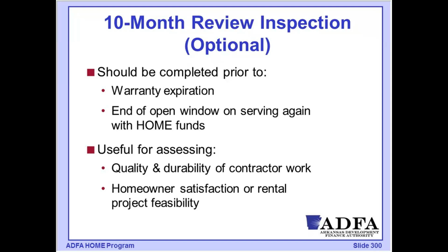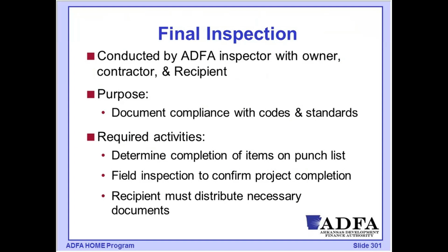More likely is a situation where we're finding that something completed by the contractor under that existing scope of work isn't holding up, there's a quality or durability issue, and under that warranty period we would still have the ability to call back that contractor and require them to correct the issue. So that 10-month timing is not required, it's optional, but it's kind of a best practice.